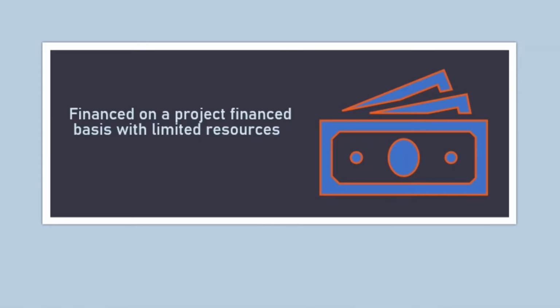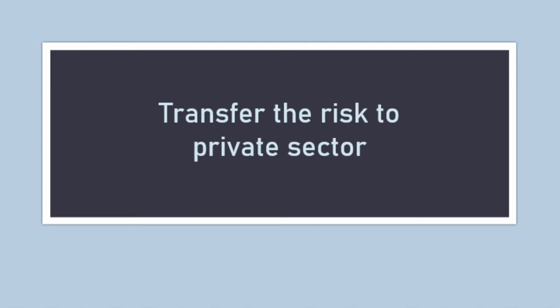There are several unique characteristics for BOT. Number one is finance on the project, finance basis with limited resources, because raising of finance is entirely by the private sector without the involvement of government. Since the private sector fully manages the project, the risk of the project is transferred to the private sector.